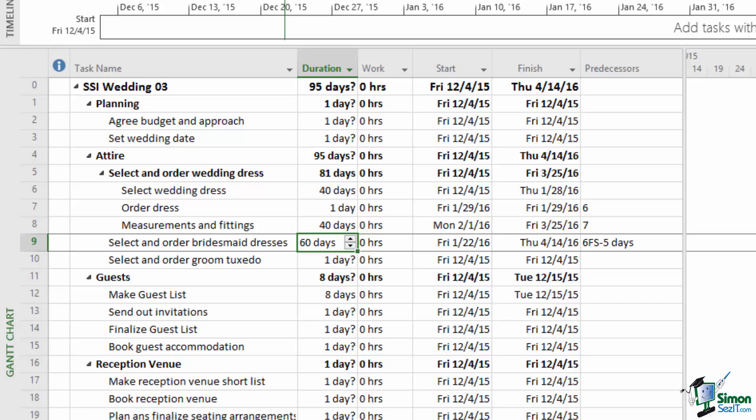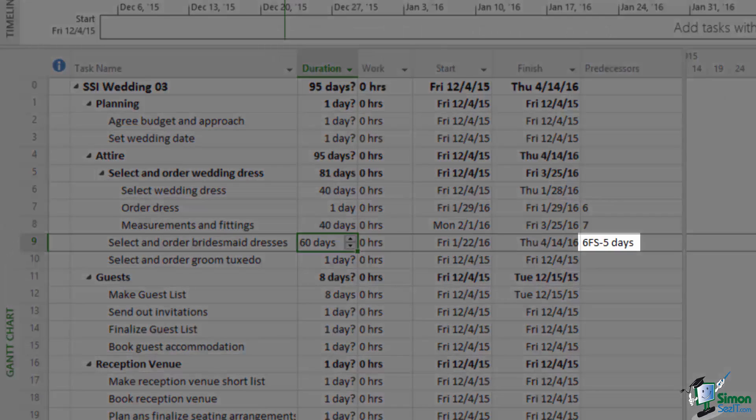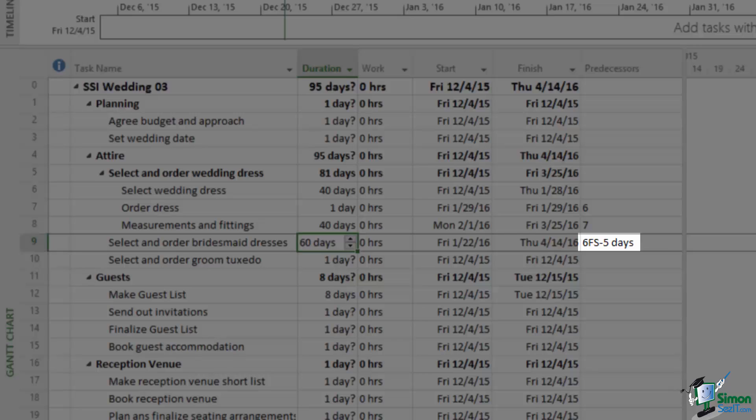If there's more complexity to the dependency then you'll see something such as you can see for Task 9. The dependency is on Task 6 so it begins with a six. The FS basically says this is a Finish to Start dependency which is the default. But the reason it says that is because it then says minus five days.